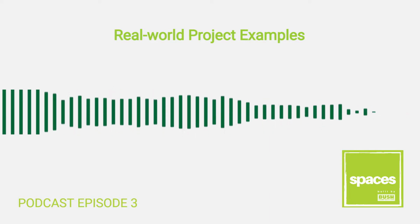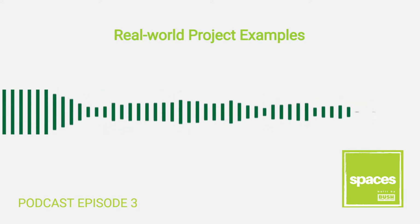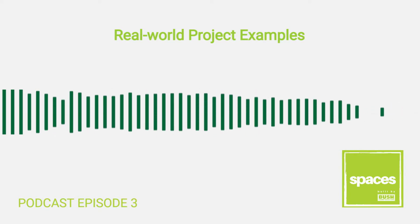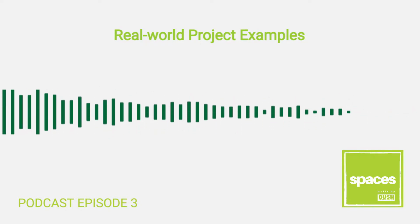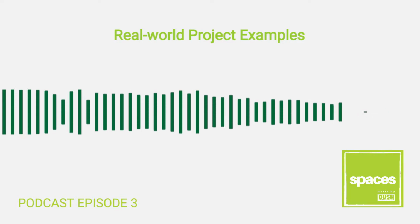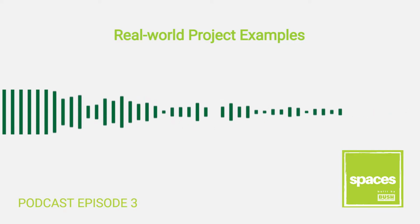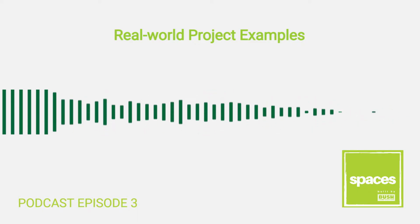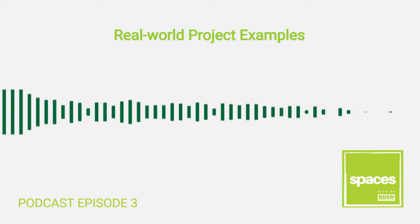Okay, so you also asked, give me some real world examples of when this has worked well and when it hasn't. So, two examples. We built a school project a number of years ago, and this is an example of when it really worked well. It was a brand new school, with a client, the school district, who has managed this many, many times before. It's a school project, not too difficult. It was not a terribly contentious relationship because the owner understood the delivery method. The architect understood the delivery method. While it was a low-priced award, the project ended up going very, very well because of all the alignment: it was non-complex, it was a greenfield site, and the owner knew what to expect and had done this before successfully.